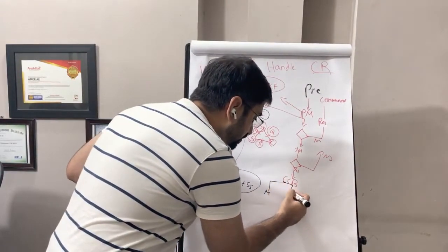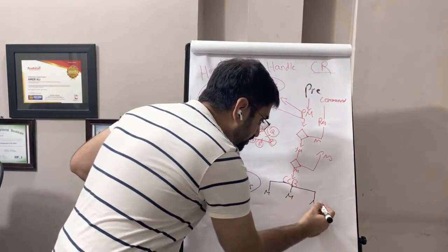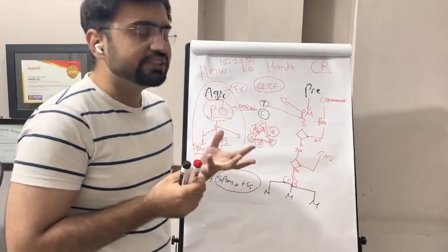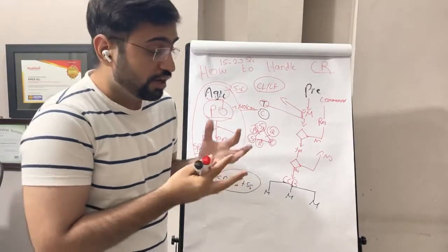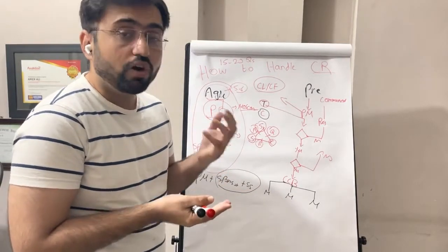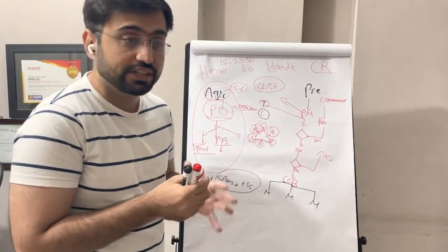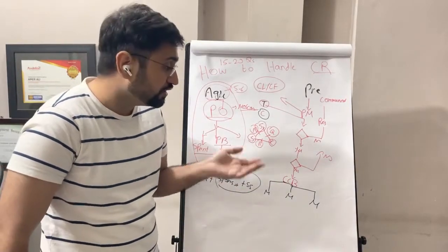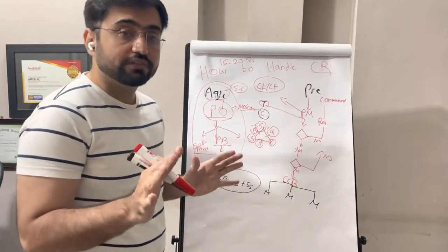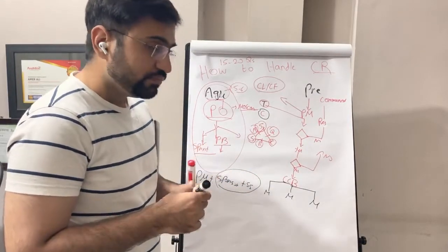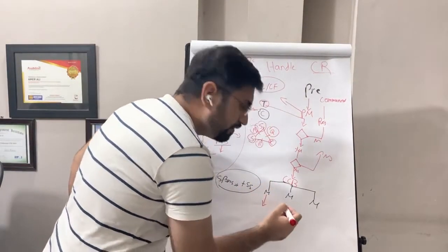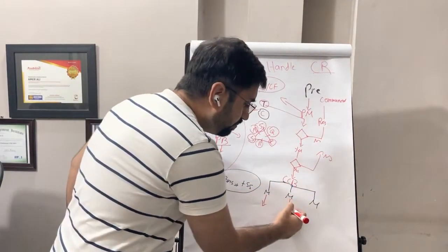minor, moderate or major. So in other words, how much the change is affecting the baseline, depending upon the organization's tolerance, whether the organization is risk averse or a risk seeker, all those things, how it is affecting the scope, the cost, the schedule. And if the change is minor, the PM can approve it himself. If the change is moderate, stakeholders and PM can approve.